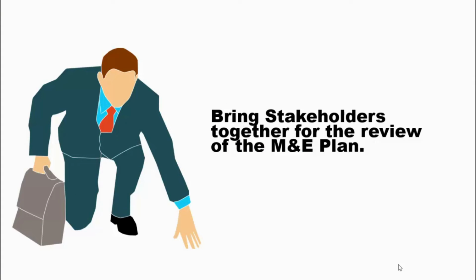Okay, so you've written your M&E plan document using the template that I shared with you. But I have to mention that that is a pretty basic template, okay, believe you me, because for bigger interventions, you might need something much more elaborate. So after you've drafted the M&E plan, the next stage is to invite all the stakeholders for a meeting where they can review this M&E plan.